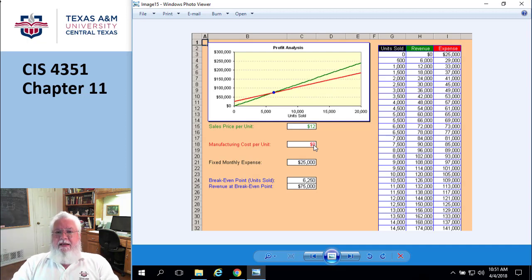And then the last one is mitigation. There's two forms of mitigation. One would be to attempt to lessen the probability, makes sense, or to lessen the impact if it does occur. And of course, those are very, very issue specific. Right. So mitigation is probably the last. Probably I would try to go for avoidance first, like make the problem go away. Woohoo! Transfer second, mitigation third, and the fourth one would probably be the acceptance, where I say, too bad. I'll just let that happen.